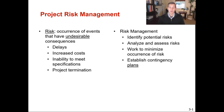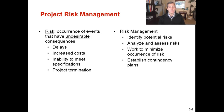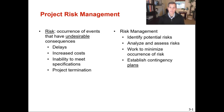In San Diego, for instance, if we're doing some kind of construction project, we generally don't have to worry too much about bad weather delaying the project duration time. But in other cities and states where the winters are terrible, summers are really hot, or there's flooding, you have to take into consideration a greater risk of projects not being completed on time due to poor weather. So they can put contingency plans in place like having additional contractors ready, being prepared to pay for expedited shipping, having additional labor available to work overtime — having those contingency plans in place in case some of those project risks start to come to fruition.